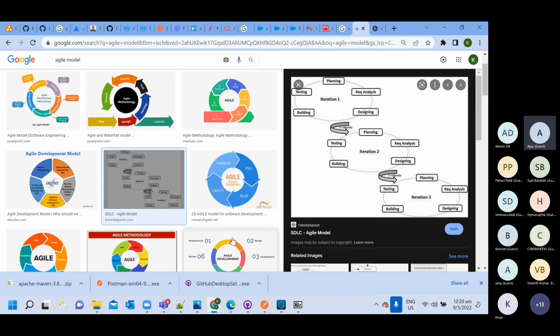If there is a very simple API change, meaning one CR, change request, for one API, a small change is required in logic, and then we need to test, that will get 3 story points. If you have new development of any simple API, that will get 5 story points. If you have medium complex API development and testing, everything is there, 7 story points. If you have a bit more complex API, then 9 story points. So like that, story points will be given to each story.